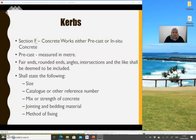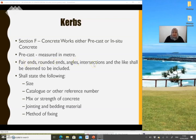Curves are referred to Section F — either concrete works, precast concrete, or in-situ concrete. If it's a precast kerb, it should be measured in meters. If it's in-situ concrete, it should be measured according to Section F. Any fair ends, rounded ends, angles, intersections and the like shall be deemed to be included.